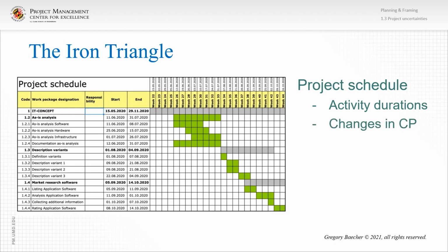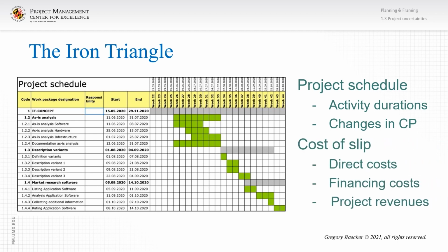The critical path is the longest chain of activities through our schedule. That's the total duration of the project that controls how long we will take from the start to the finish of the entire project. Maybe we're wrong about the critical path. Maybe things will happen during the project that change the activity durations of activities on the critical path. And so the path that we thought was critical no longer will be, and some other path will become critical instead.